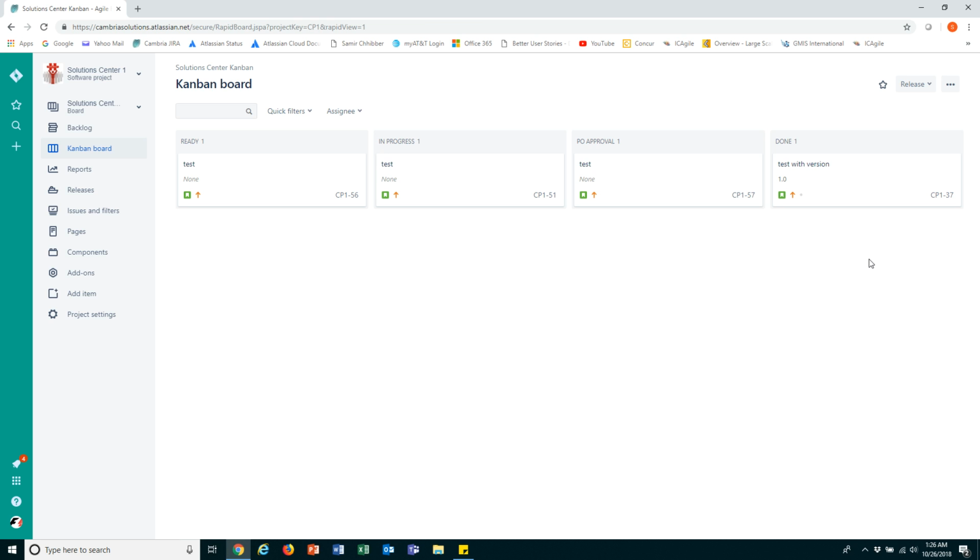the next easiest way is to just simply leave the version off, and once a week or whatever your interval is, just come up. I recommend end of the week. Maybe make it one of the last things that you do, and just hit release, hit new version, give it that date, and then hit release.